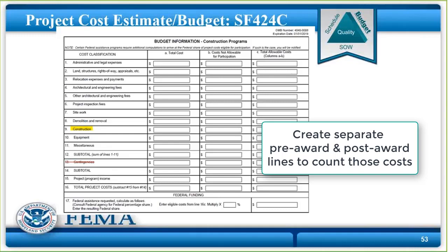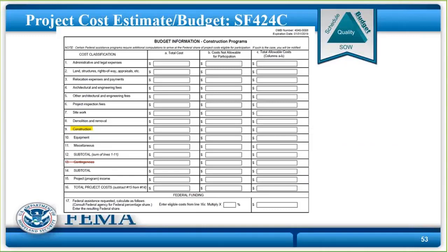You can literally, prior to award, ask FEMA, we want to claim another $15,000 worth of expenses because that's how much it's taken to work on all of these post-selection pre-award issues. We will release your budget back to you, allow you to put those cost line items in and change them so that when we make the award, you have FEMA approval of all of those pre-award costs.